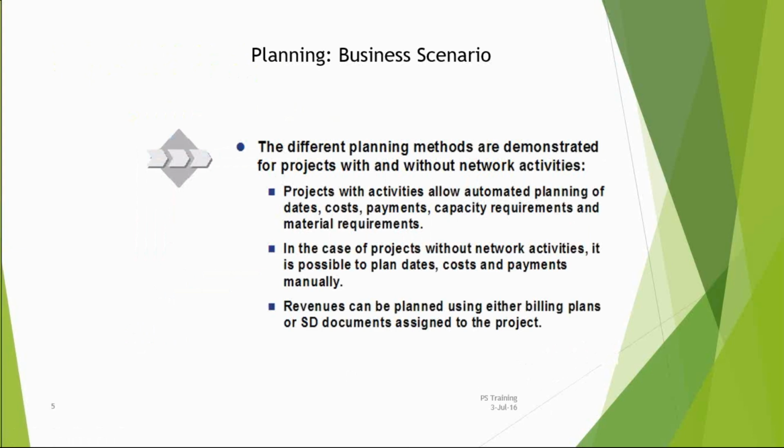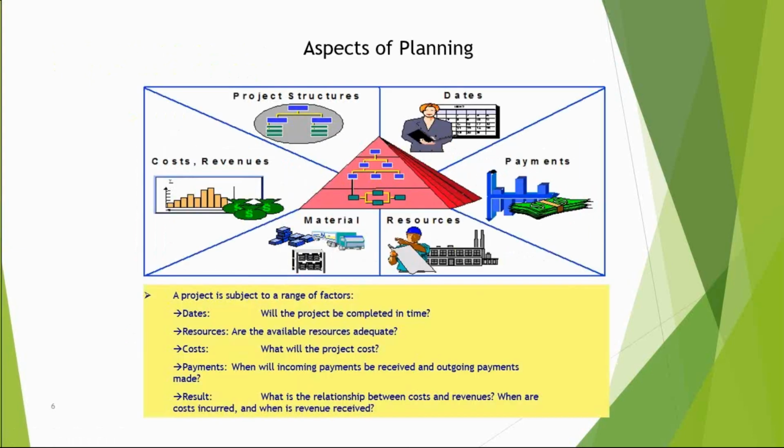So normally, whenever I have activities under my WBS, all my plannings, all my cost plannings or my date plannings will be accumulated to my parent WBS. As I told you yesterday, the cost of the activity is accumulated along with the cost of the WBS only. WBS is a bucket where it captures all the cost of its child WBSs and child networks and activities.